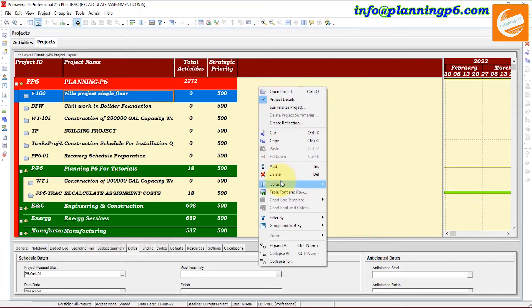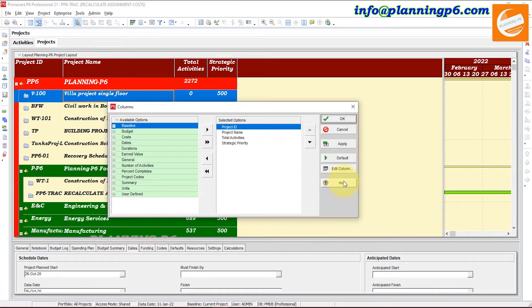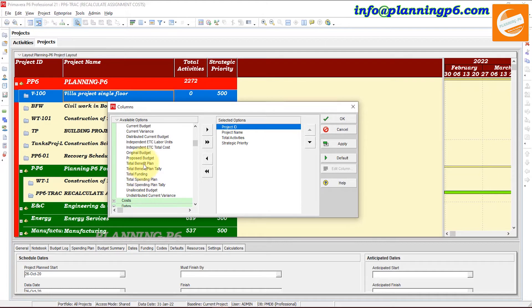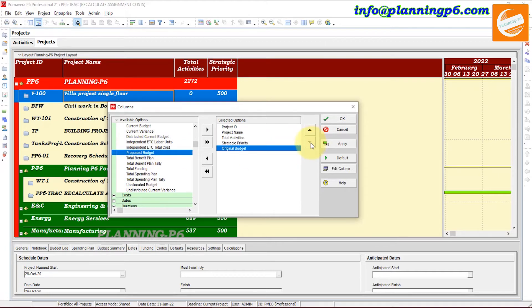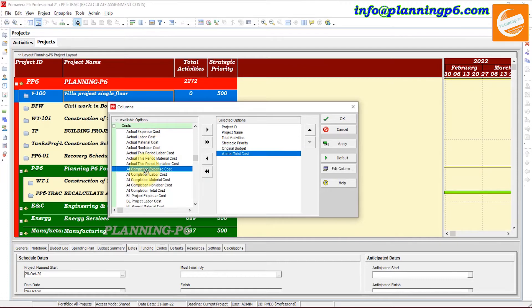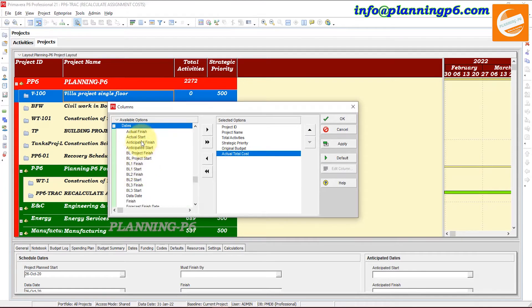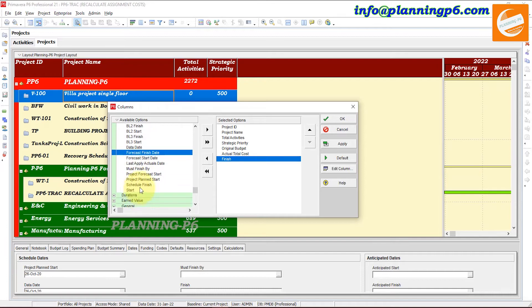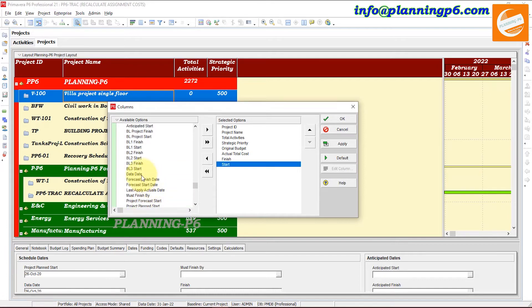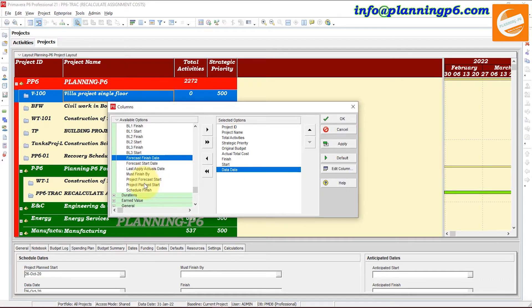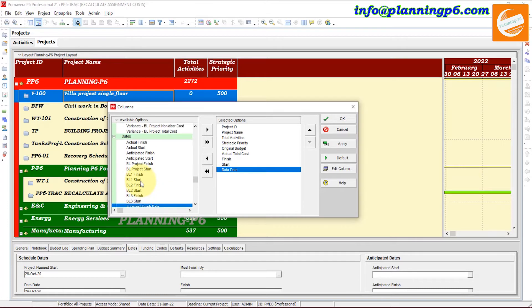Right-click here and go to Columns, then Customize. We will add some columns. From Budget, we will add Original Budget — move it down. After Original Budget, we can add Actual Total Cost from the Costs section. Then from Dates we will add Start and Finish, and also Data Date and Forecast Data Date — whatever you want you can add from here.